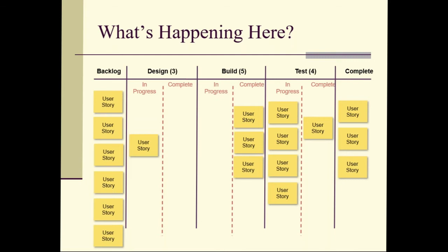Maybe a resource imbalance. Maybe I need more testers. Maybe I need more designers, or maybe I can slow down the number of builders, have fewer builders, which would put this in better balance, because the builders have built everything that was handed to them so quickly. Build, done. Now they're just sitting around twiddling their thumbs, waiting for the designers to give them something else to do. They're idle. They're just underutilized at the moment.